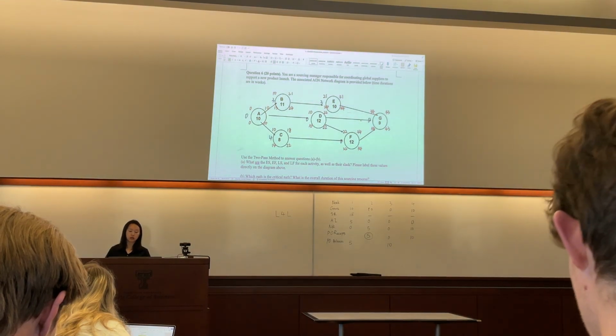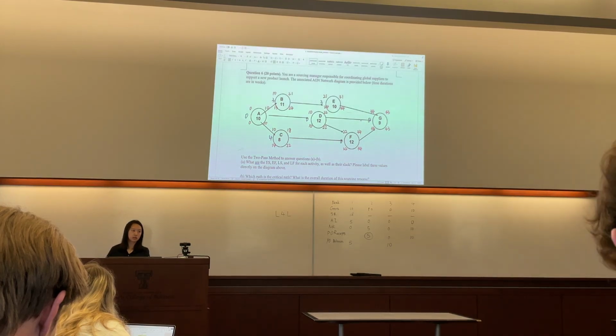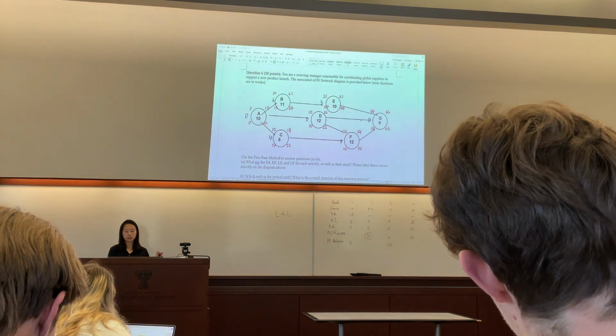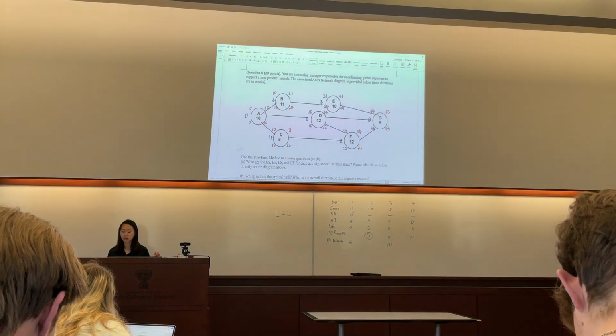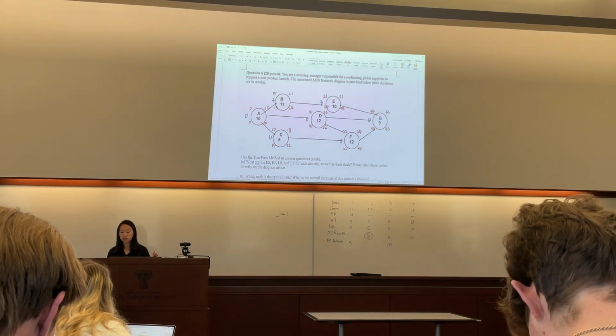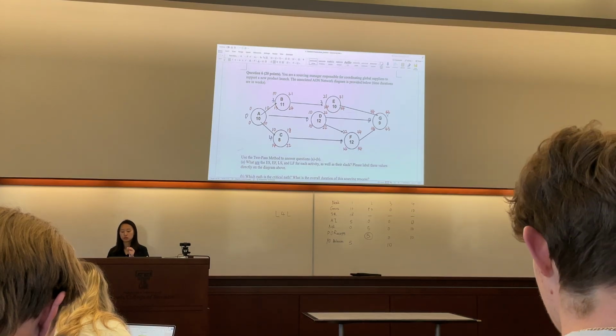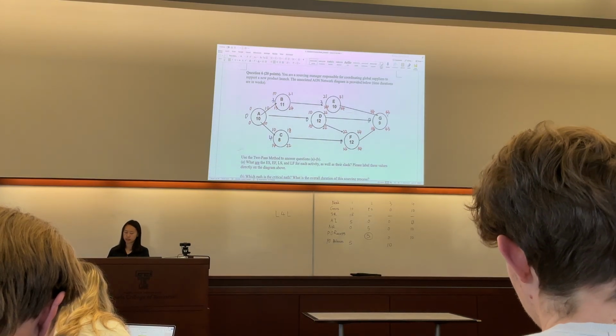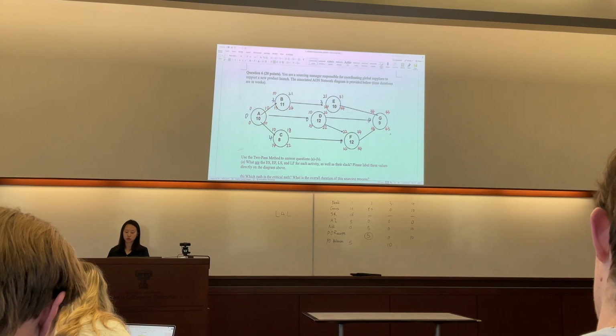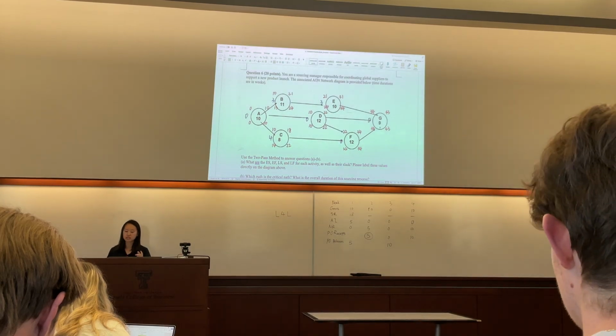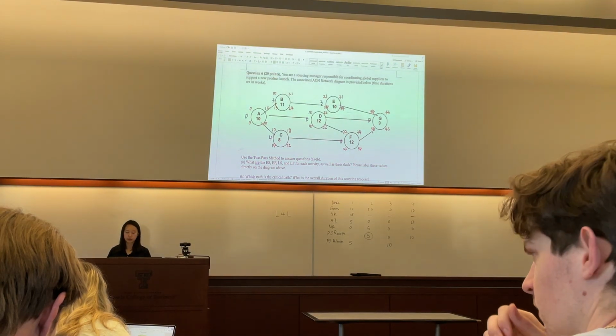After you have the total forward pass, then you need to calculate the backward pass. Starting from the last node over here, we let the latest finish point equal the earliest finish point. So we let this equal 43 minus 9, that is 34.